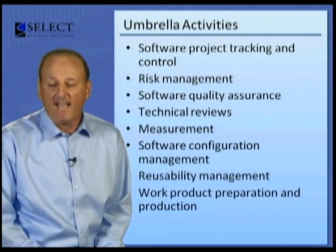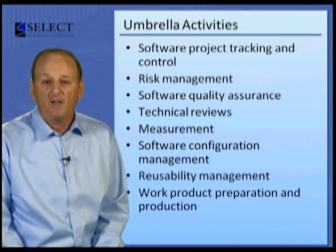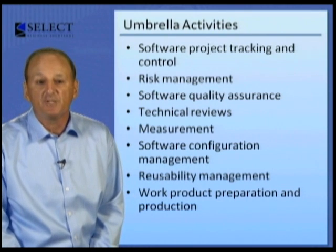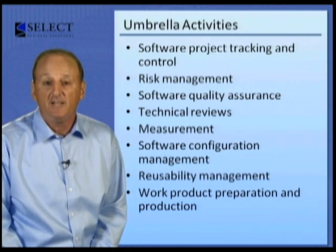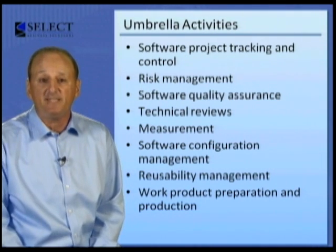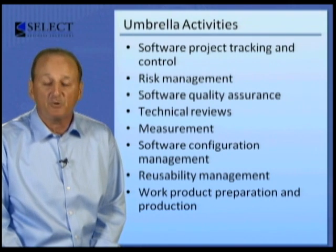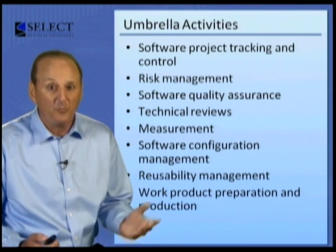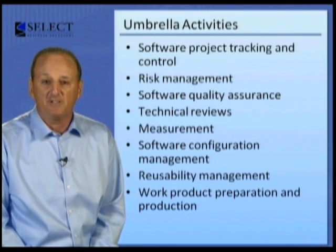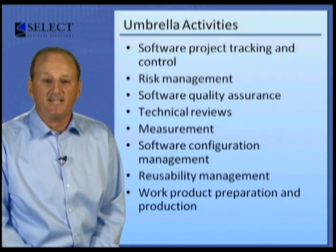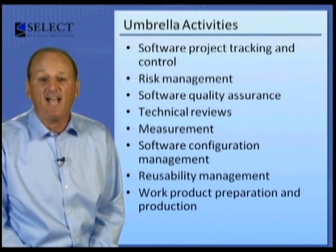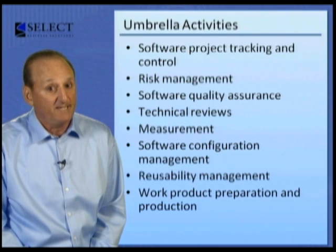The umbrella activities cover the entire software process. We begin with software project tracking and control, which assesses progress against the project plan and takes necessary action to maintain schedules. Managers and customers always ask, 'Where are we?' Software project tracking and control tries to answer that question. Another very important umbrella activity is risk management, which assesses risks that may affect the outcome of the project or the quality of the product.